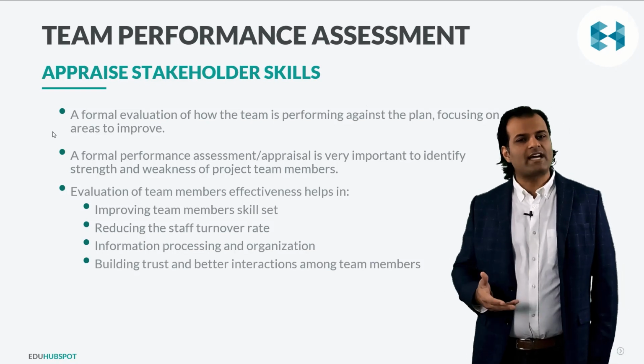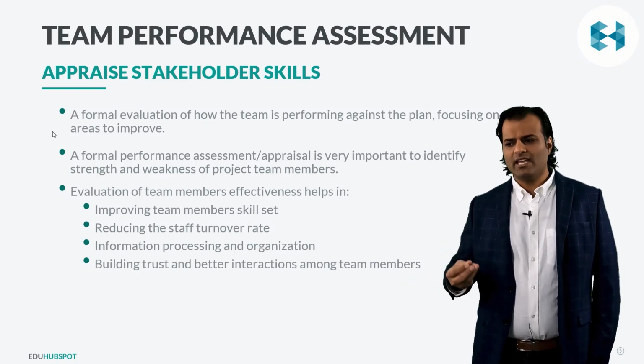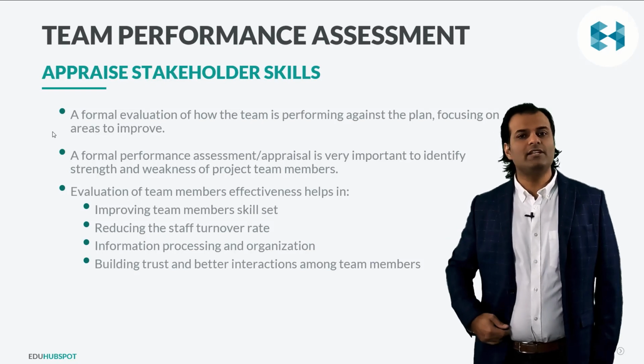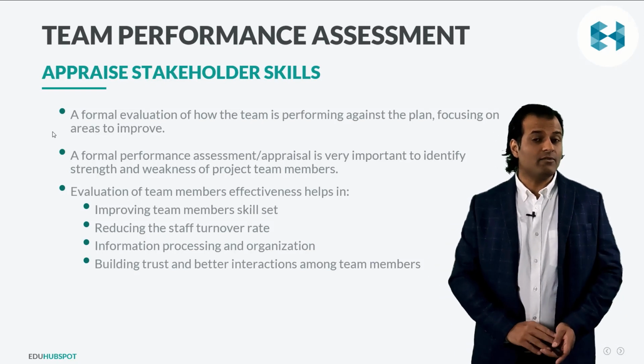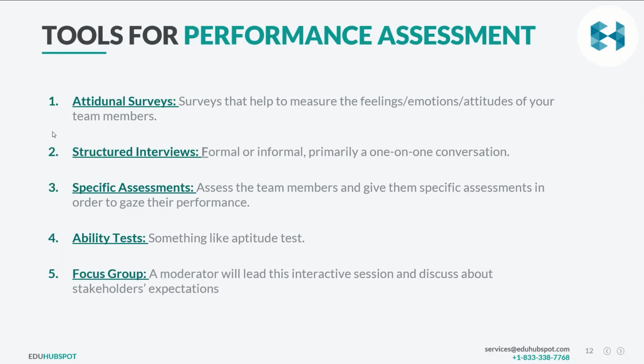Build trust, better interaction among team members. Of course, if you as a project manager are continuously talking to your team members, then it will build that trust. Some of the tools which help you to do the performance assessment, most common is the attitudinal survey. I would say a survey which is done to understand the feelings, emotions, attitude of those team members. In your organization, something like this may already be done. Like, how satisfied are you over here? Do you feel that your boss supports you? Do you see your ideas are heard? All that is an attitudinal survey.